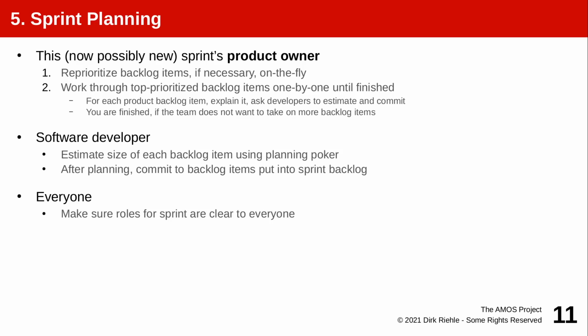And they may now be not so important. Usually they are just at the top and people want to finish them, so they're usually of highest priority. But sometimes you realize that's a complete dead end, we should stop working on it, and then they get deprioritized. So the product owner looks at what the review has put back into the product backlog and prioritizes it.